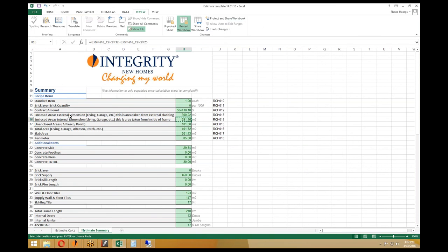Now you'll see these areas here explain how they've been calculated, and the different areas are applicable to different people. With some people you'd pay for the total slab area, i.e. concreters. Most trades you would literally just pay the internal face area. Some things, like roofing, may be done on the total area, so certain allowances are calculated on the total area. So we break it down using mathematical formulas to take out the veneers and things like that, to only pay for what trades are actually doing.